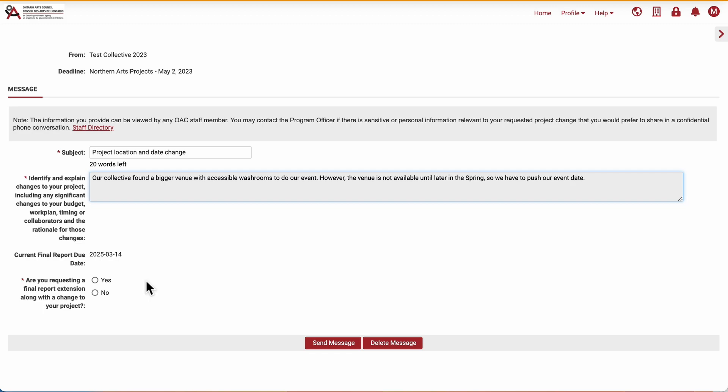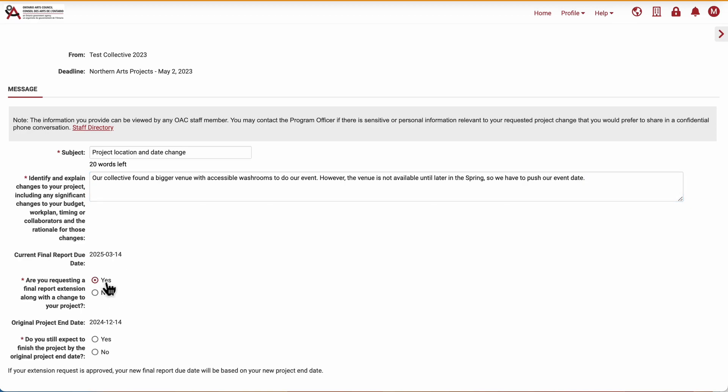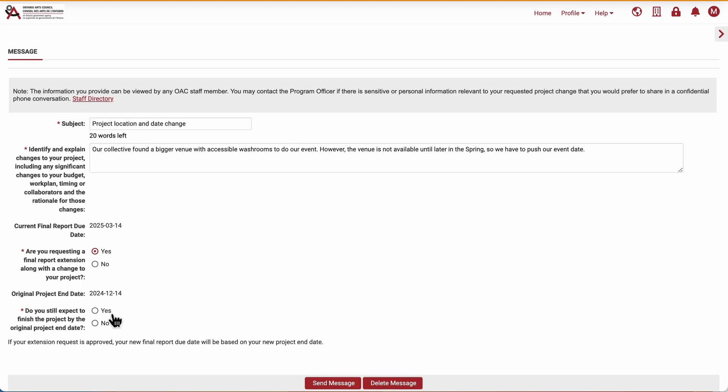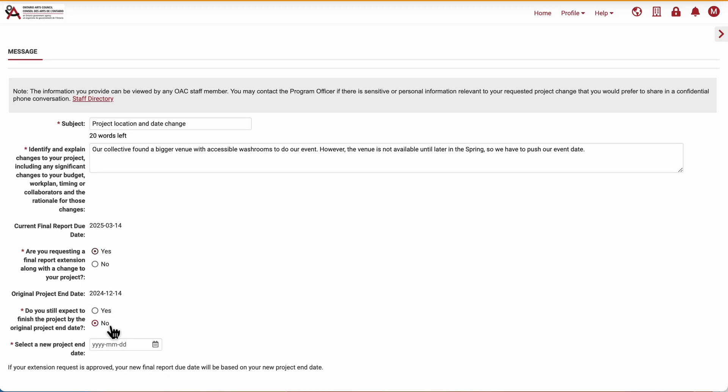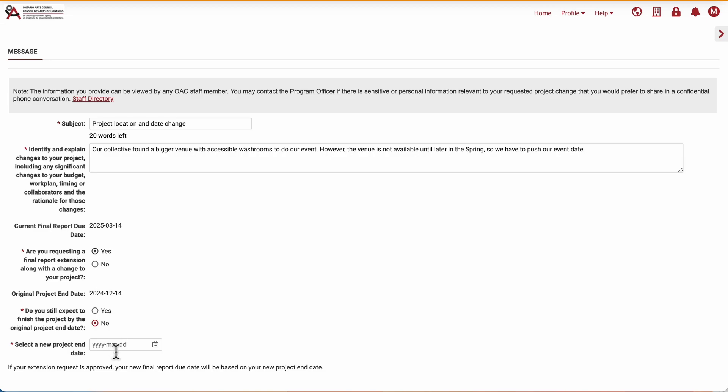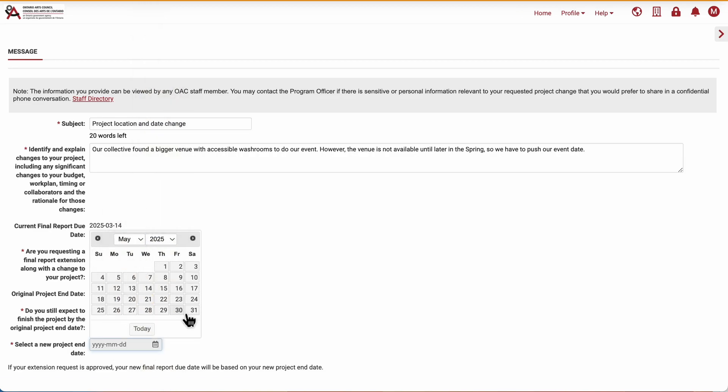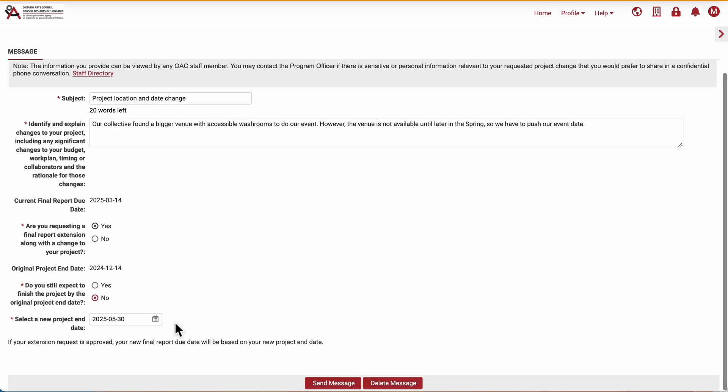Where it asks if I'm requesting a final report extension, I will click Yes, and this prompts other questions about the dates. If applicable, I can select a new project end date. If approved, the new final report due date will be based on the new end date.